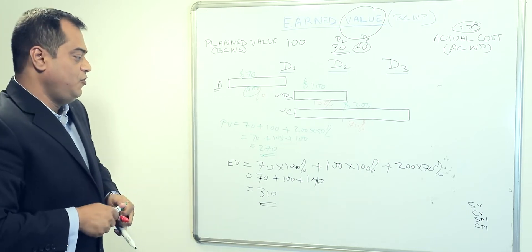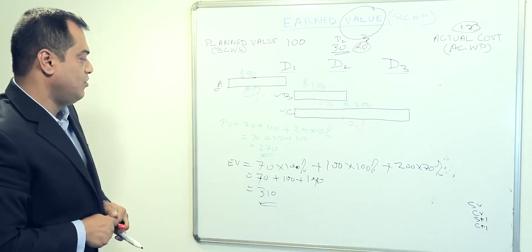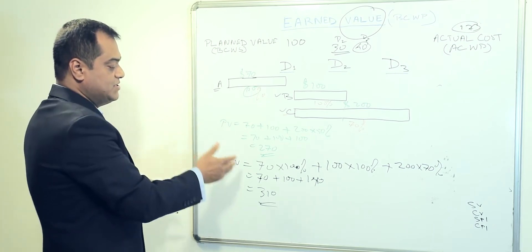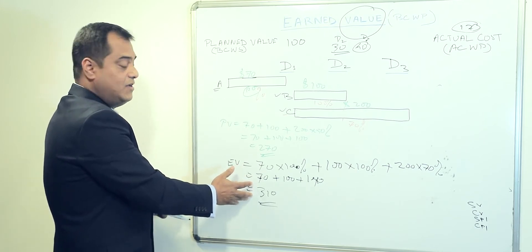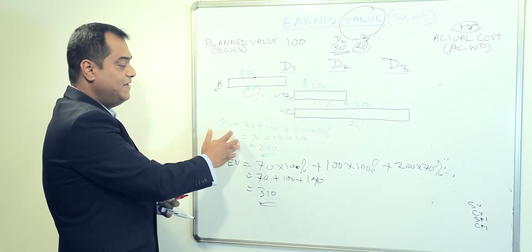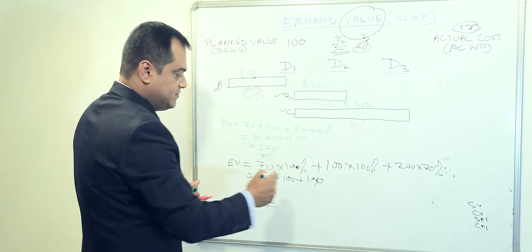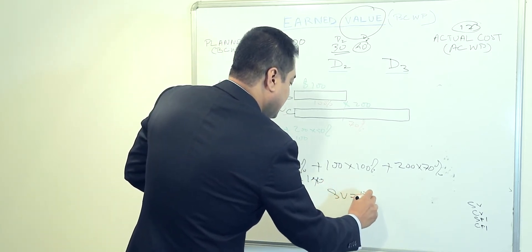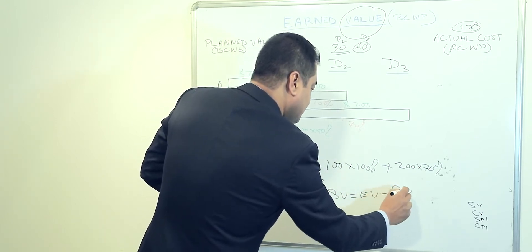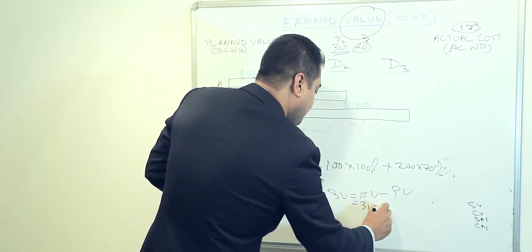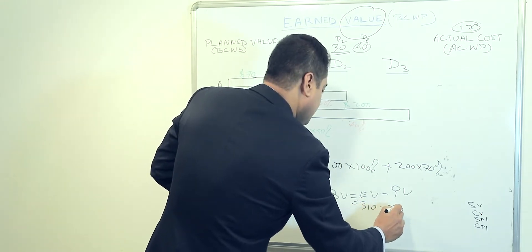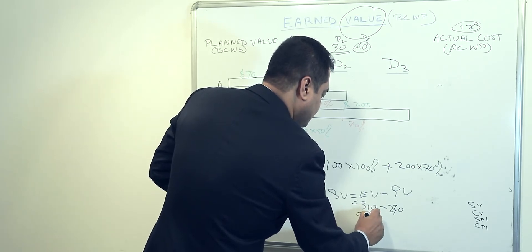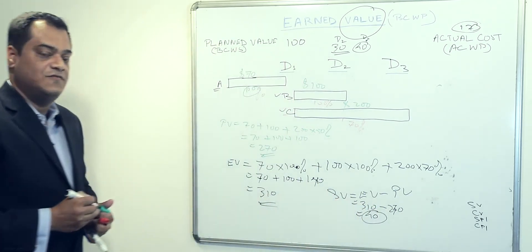If you want to compare between these two, which is called schedule variance, you are comparing the schedule of estimate earned value against plan value. So that comes with schedule variance. Earned value minus plan value, that makes it 310 minus 270, and that comes to 40. So the schedule variance is 40.